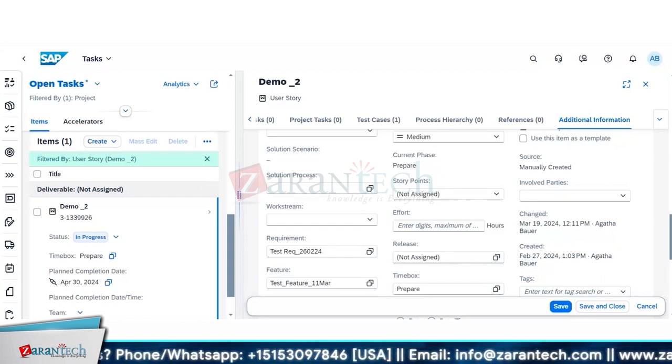Obviously, you will create test plans for your different testing iterations, for UAT, for SAT, for FUT. But apart from that, ideally you should have for one business process requirement, one test plan, so that you can test that requirement as part of one test plan.